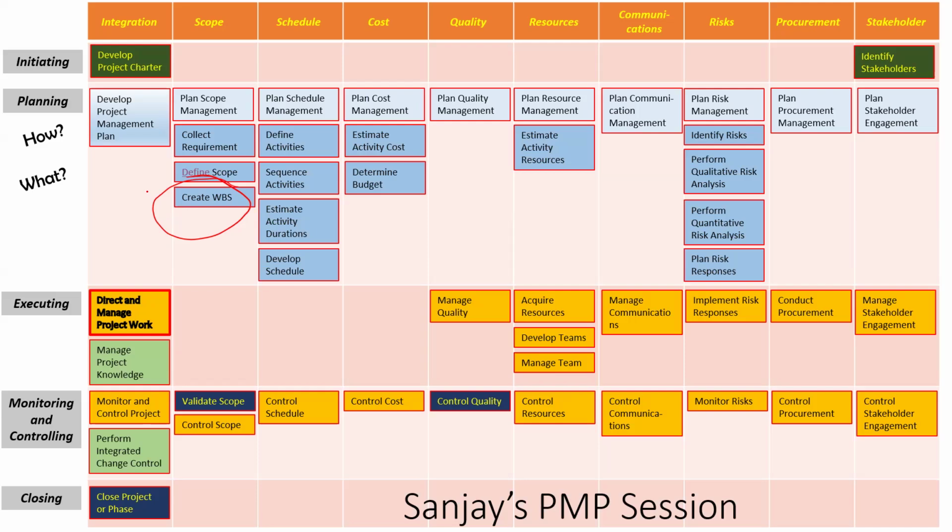He could do the estimate and all that. That's why it is here. Once these three are completed, you go ahead and create an output, and that's called a scope baseline. As you know, you are currently in making the project plan, so it requires three baselines. One of them is the scope baseline, which gets created by the collection of these three processes: collect requirements, define scope, create WBS, put together, create a scope baseline.